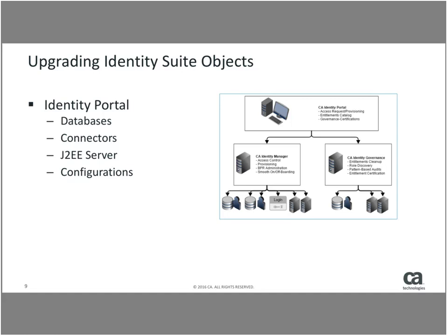Validate them, and then essentially you have to be able to do an entire UAT across the whole identity suite deployment. So these are the requirements to be able to move information from the previous version up into the updated parallel environment, and then be able to put that online and sunset your older application platforms.